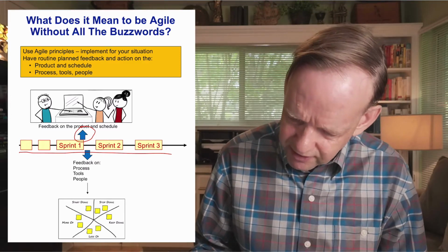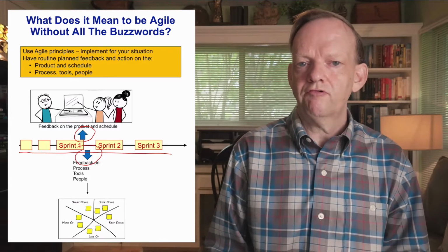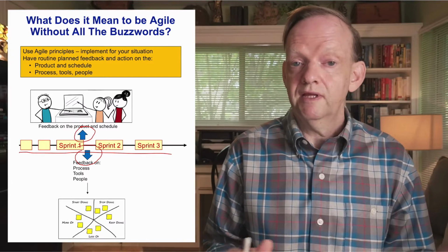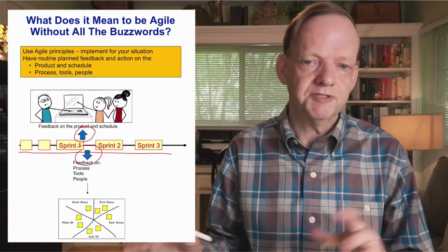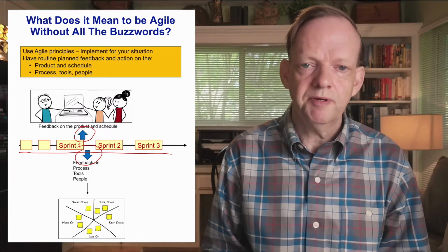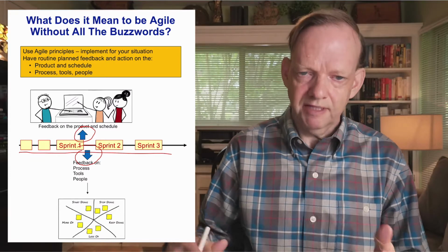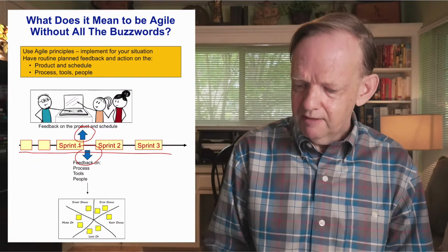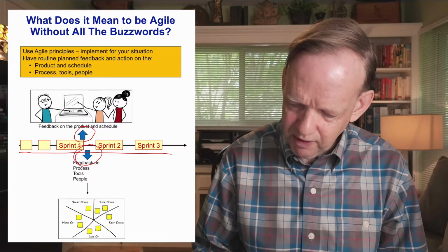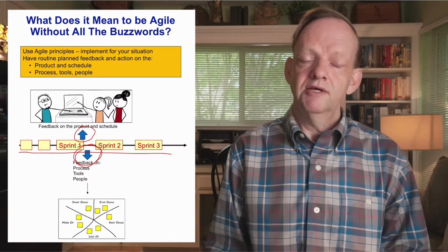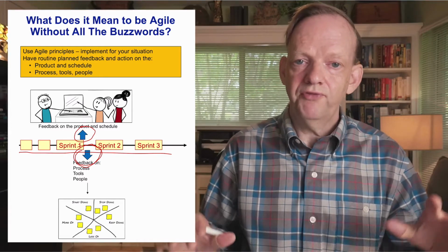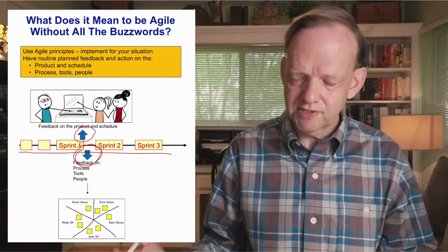And secondly, there is a lessons learned or retrospective activity to get lessons learned back to the team. So to determine how they arrived at this point, things that went well to repeat, and things that could be improved for next time to make the next iterations go better. Most teams do a very good job on the demo part of it and less well on the retrospective part of it. So the essence of Agile is getting regular feedback on the product and the process of the team